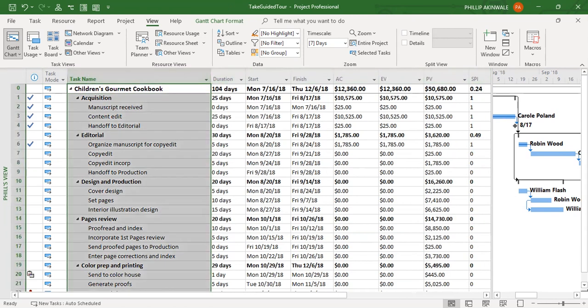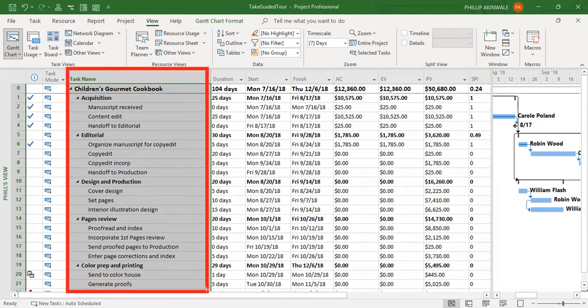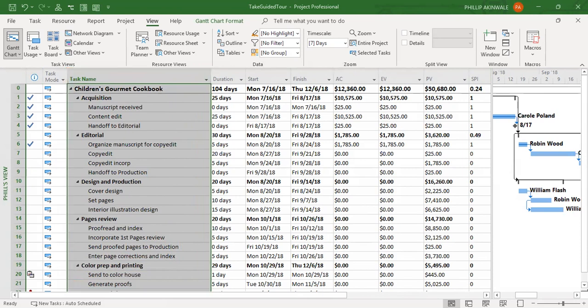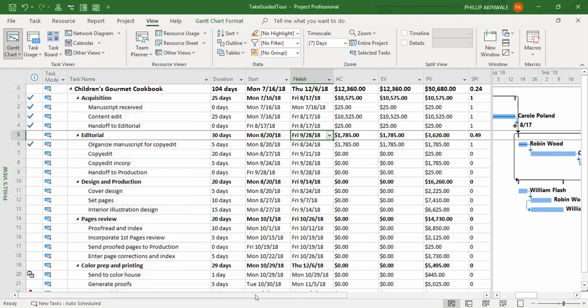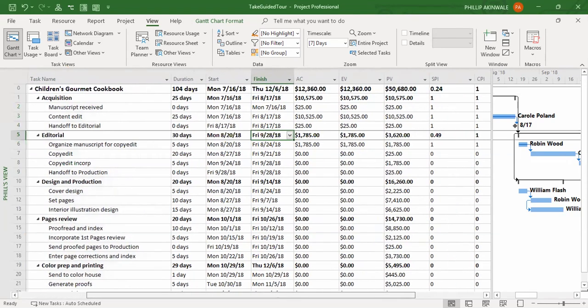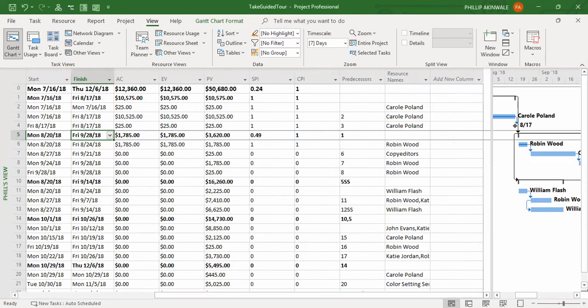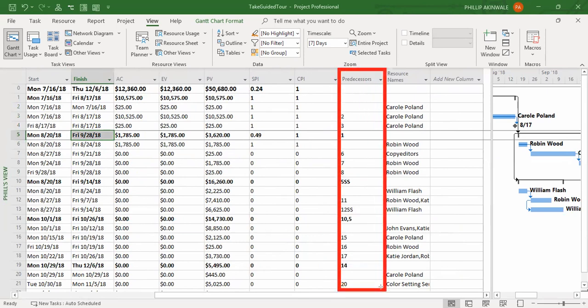When you read chapter 6 and it talks about define activities, defining activities is pretty much what you do here. This is define activities. When you have defined your activities, what do you do next? Walking through the process of schedule, you sequence the activities. You sequence the activities using this column that I'm showing you right here. This is the predecessors. You decide what comes first, what comes before A, what comes before B, and so on.